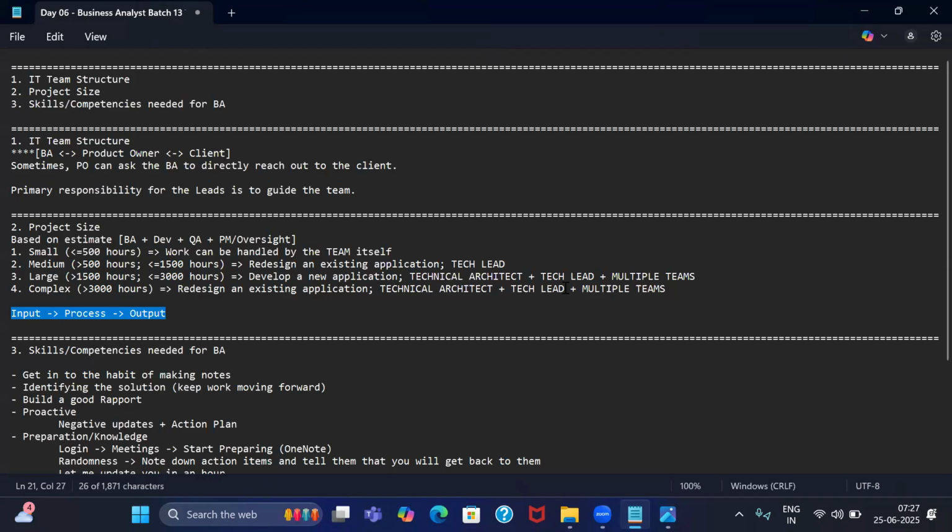Okay. Now all of a sudden what happened? Because the BA did not plan for the activities well, the team will suffer. Okay. So now the BA will come back to the team and say that team A will start the work after 1 month. That's when they can give us the files. Okay. So we need to wait for 1 more month. That is option one, wait.